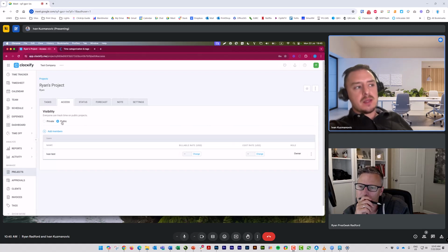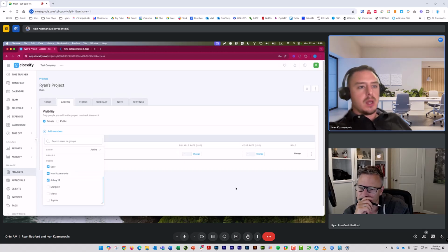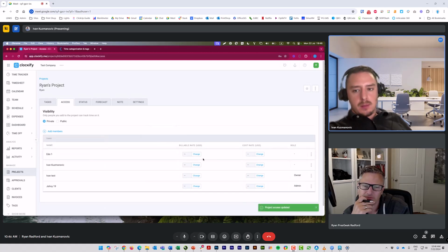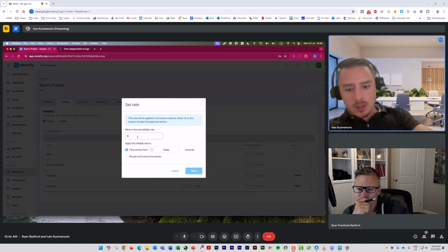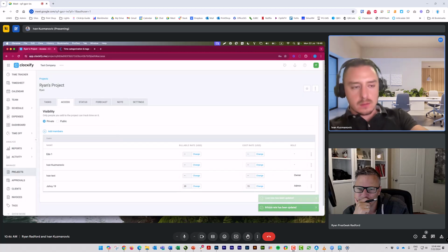If I make this project public, it's going to be visible to all my employees. If I make it private, it's going to be visible only to people I add to this project. So Edo, Johnny, Maria, etc. I added them right here. And I'm able to say that whenever Johnny is working on this project, his billable rate is going to be $20 per hour and his cost rate will be 15.